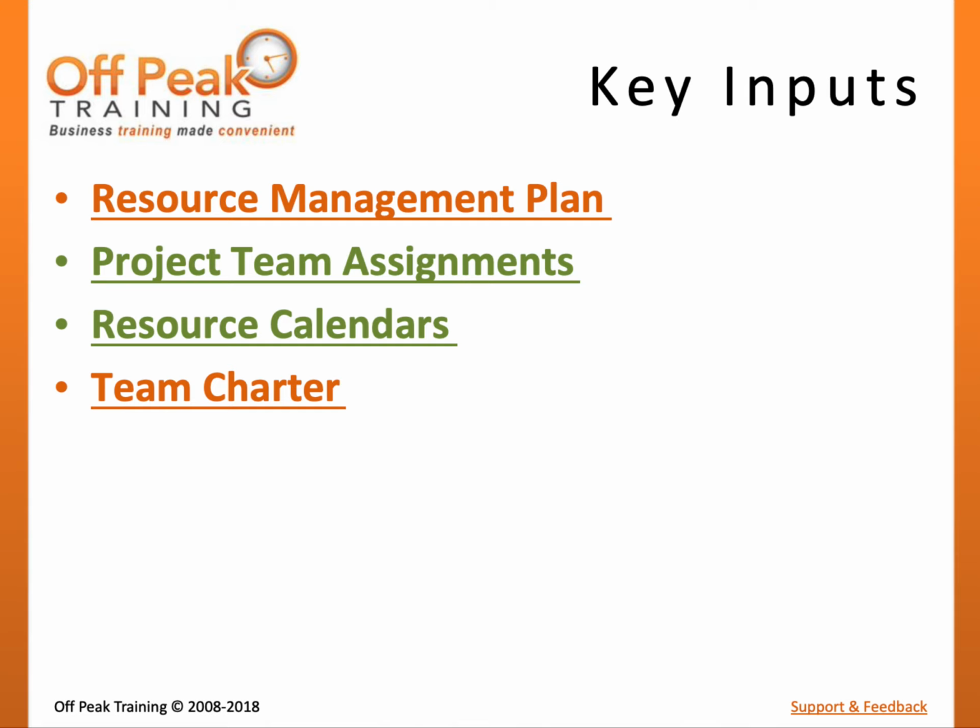Resource Calendars provide information regarding the availability of the team, which may affect the timing of team development. The Team Charter sets guidelines and expectations for how the team will operate, make decisions, resolve conflict, and other team values. Early commitment to these guidelines will help decrease miscommunication and conflict.